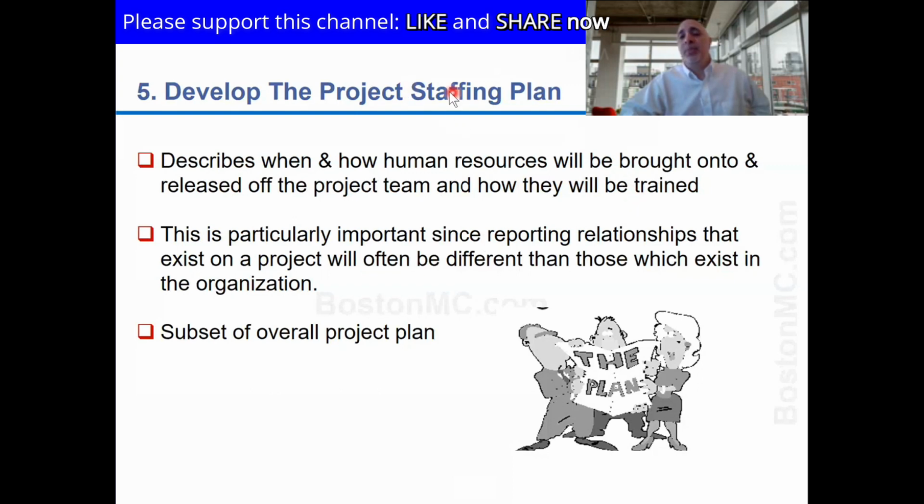So this is a staffing plan for the project. See, it includes how we're going to bring them in, how we're going to get rid of them, how we're going to return them, how will we pay them, do we need to train them, do we need to develop their skills. So there's more to planning than just figuring out who's actually going to be doing what activity.